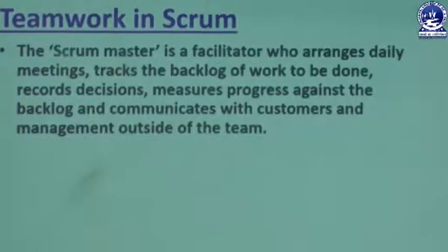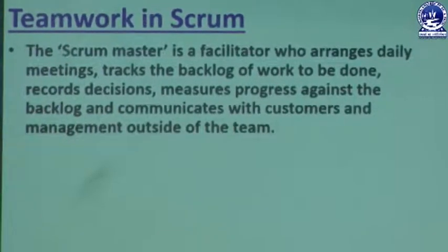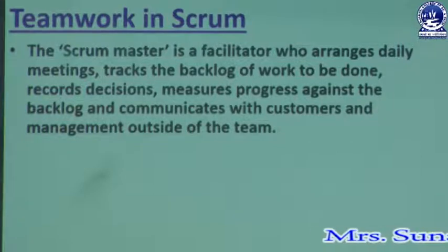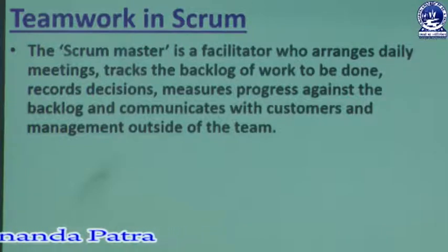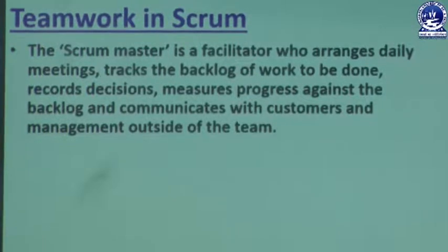So let's see what the teamwork in Scrum is. If we divide the teamwork in Scrum, we will have two actors: one is the Scrum Master and the second is the team members. The Scrum Master is a facilitator who arranges the daily meetings, tracks the backlog work to be done, records decisions, measures progress against the backlog, and communicates with the customer and management outside of the team.